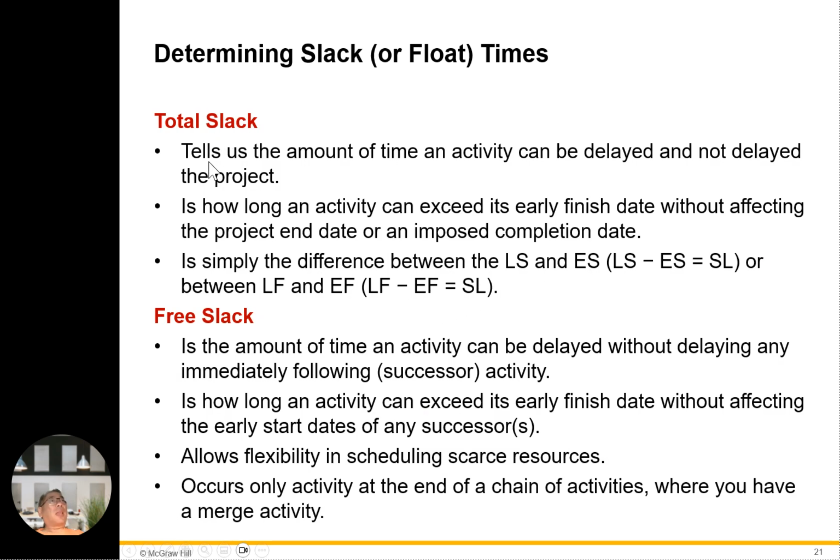Total slack. The term is slack of float times. Okay, it tells us the amount of time an activity can be delayed in the project. Total slack is how long an activity can exceed its earliest finish time or late start without affecting the project end date or imposed completion date. It is simply the difference between LS and ES, which is slack, total slack, or between LF and EF, which is slack.